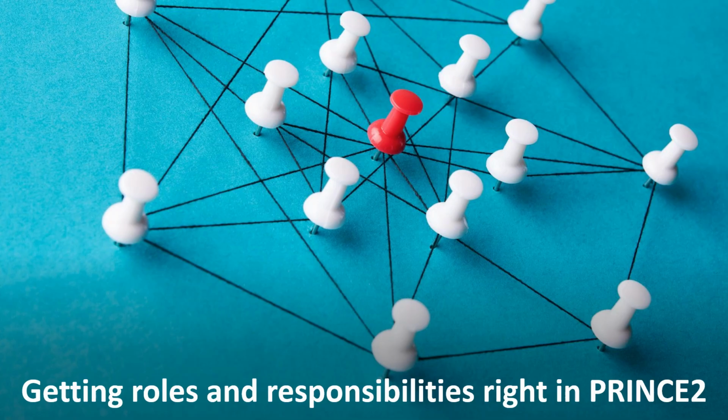But I guess this is where people get confused, right? They focus on other things instead. Absolutely. A classic mistake is mixing up this foundational structure definition with, say, communication protocols. How so? Well, teams often jump ahead. They start figuring out who needs which report, how often they get updates, the stakeholder communication details. Like a comms plan. Yeah, but defining the means and frequency of communication belongs under the communication management strategy. It's important, sure, but it's a separate theme. It's not about defining the roles themselves.